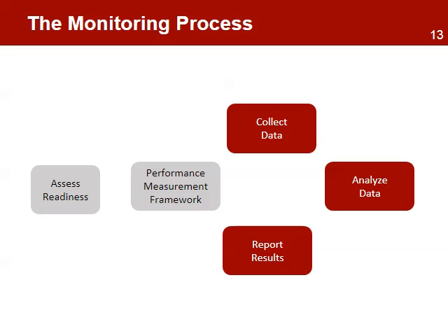Monitoring follows a simple process during the life of the project. The regular elements of this process include an assessment of the readiness and capabilities of the project for results-based monitoring, definition of the performance measurement indicators and tools, the collection of data, the analysis and interpretation of the data, and reporting of the results. This is also a cyclical process. The reporting provides information to make the required changes to the process, to increase its efficiency and effectiveness in providing the information the project stakeholders need to make decisions.